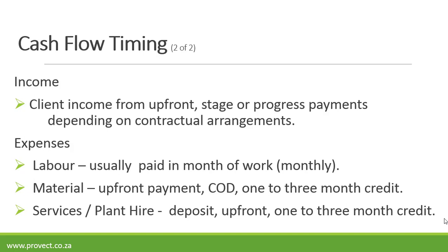Labor is usually paid in the month of work. For material, you can pay upfront, cash on delivery, or one to three months credit from your supplier. For plant hire, you normally need to give a deposit, or it can be an upfront payment or one to three months credit.